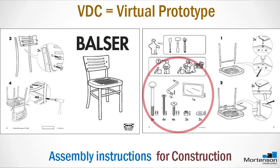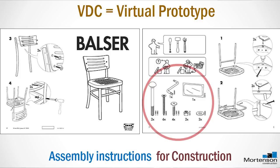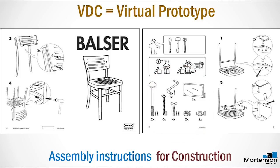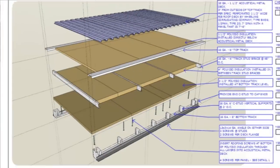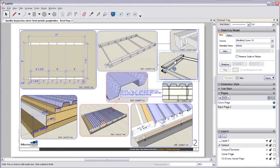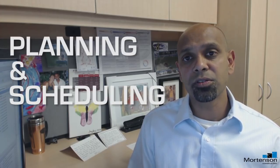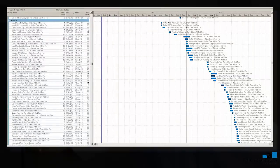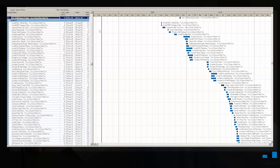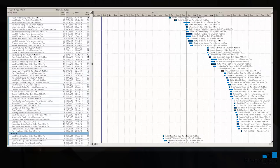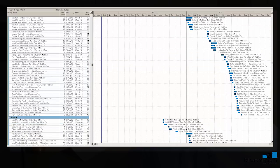Now also look at the tools and the parts involved in assembling this chair — these are all assembly instructions for construction. When our teams perform VDC, in essence we're creating assembly instructions for our crews to go out and build work effectively, right the first time. Let's take a look at just one of our construction work processes: planning and scheduling. Every project is built from a construction schedule, like this one — a traditional view where each row represents a set of activities with a start and end date. In any given project, there may be 300, 500, up to 30,000 activities required to complete a project.